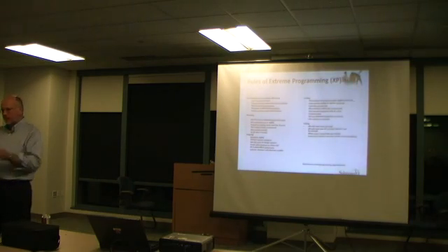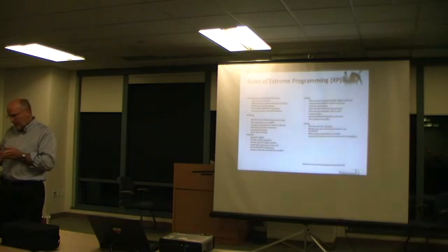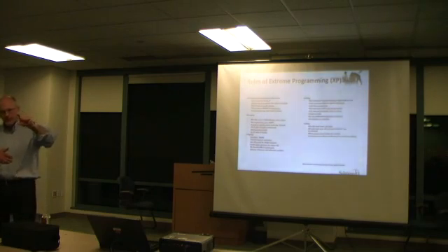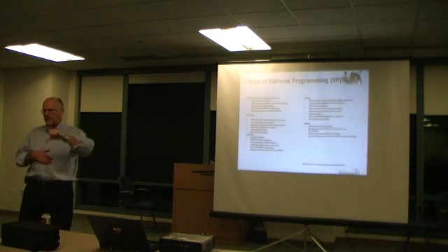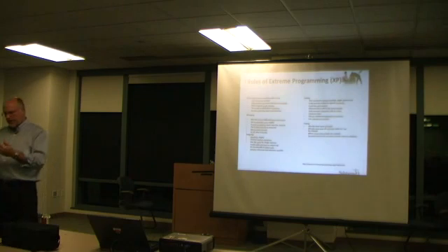When you sit down to plan your iteration, part of our iteration planning is to say, okay, what are the tasks that I need to get this story done? As a customer care agent, I need to be able to log all calls that I make so that I have good reporting. Okay, so to do that, I need to have a database field and a screen field, and I need to do UI, and I need to do these 5 things.